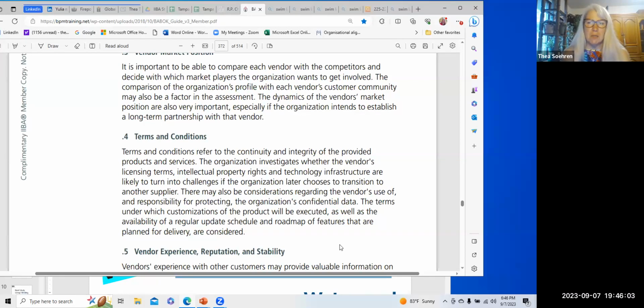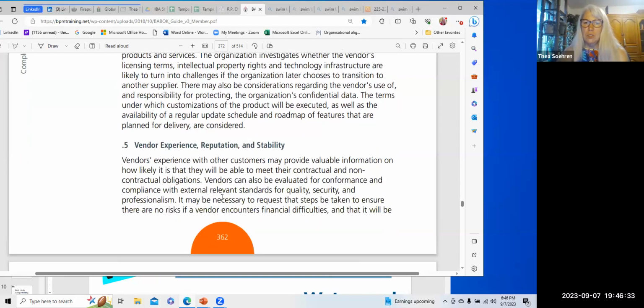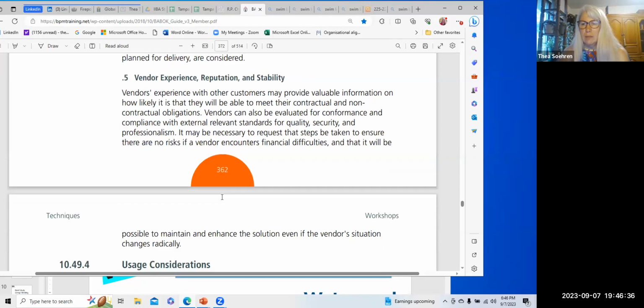In other cases, that's not okay, because their level of delivery on those tickets sometimes can be weeks to get those things done. So you need to really be aware of what's the practice, what are the guaranteed levels, what happens if they don't meet the guaranteed level. Is there a monetary penalty if they don't meet this? You know, all of that needs to be considered. And although this is part of vendor evaluation, it's getting into the legalities of the contract. And so the more you get into vendor evaluation, you're going to be working with the legal team as well.